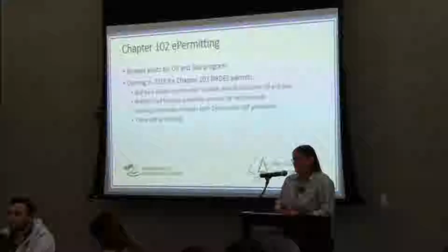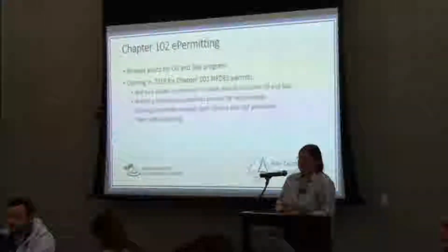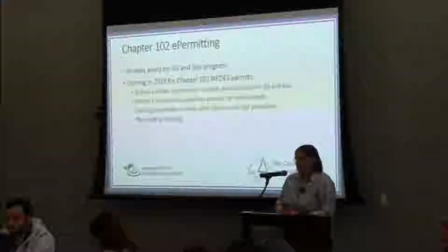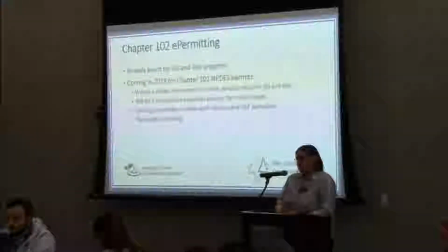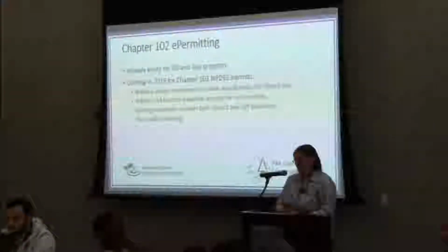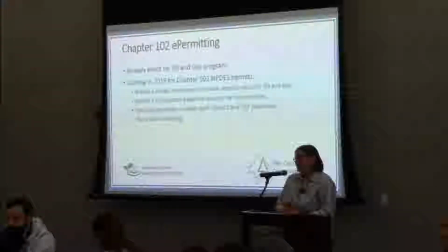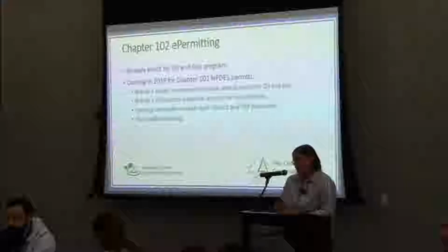Any questions on 105 e-permitting? Sure. When there's comments posted back, is there a notification, or is it on the user to constantly check in? No, there's a notification sent back. And then electronic payment, credit card, like online, for the actual general permit fee can be done online. The conservation district erosion and sediment control fees still would have to be submitted for the E&S reviews. That's still being worked out.